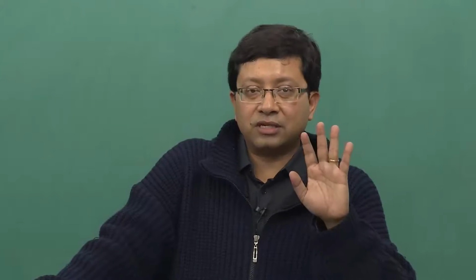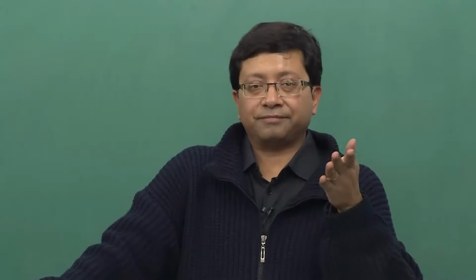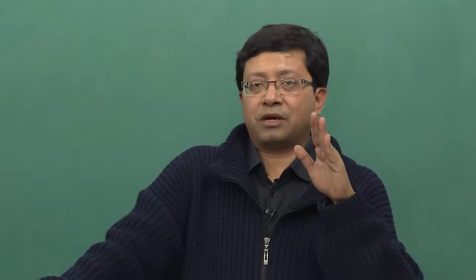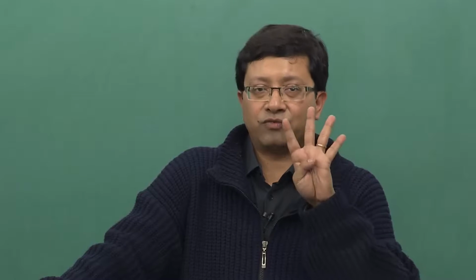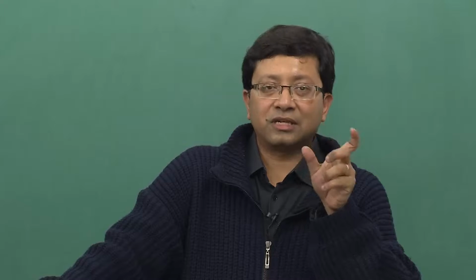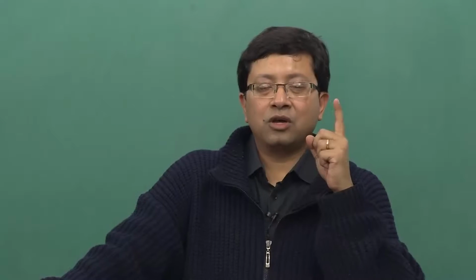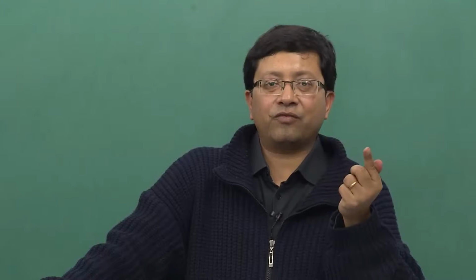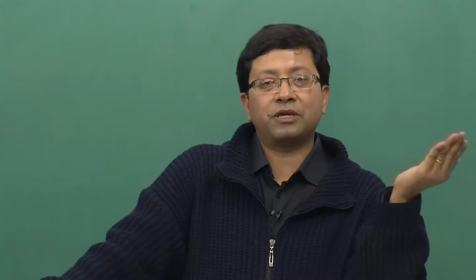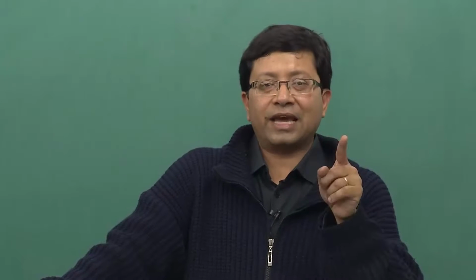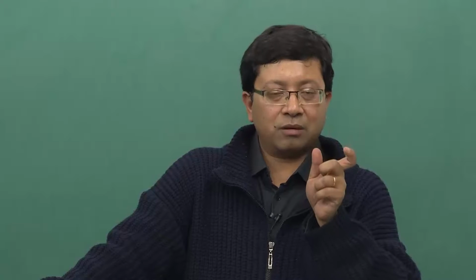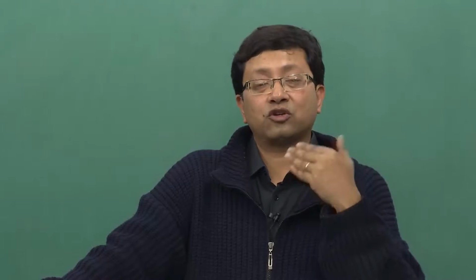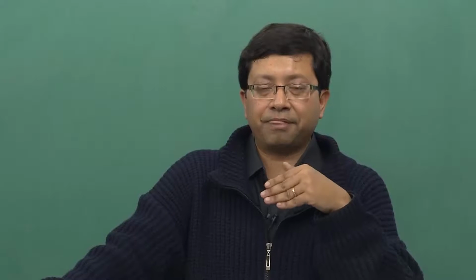Now, I will pause here and give you some more details. If you remember the concept of PERT or the CPM, critical path method, I did mention 4 different ways of aligning the jobs or activities. One was end to start, that means the ending of A, being the previous job, and B being the later job. So, as A ends, B starts. There is a number of days which is there, and that is the concept based on which we drew and solved all the problems for the PERT and CPM.